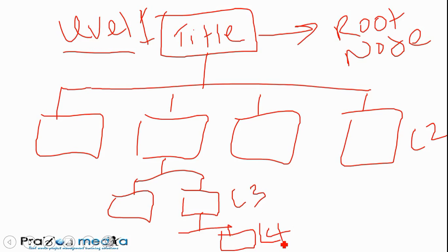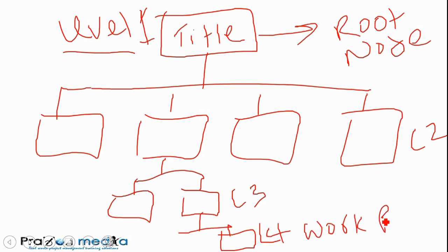Let's say level 4 is the lowest level of the work breakdown structure in this example. The lowest level of the work breakdown structure is known as the work package. Some people refer to this level as the work package level. It could differ depending on the WBS you're looking at.